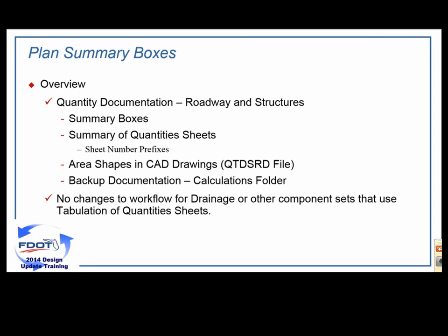The biggest impact with this new process is that it's really mostly the roadway and the structures design groups and those component sets of plans. Every feature that we've got out on our roadways, all the work that needs to be done, so all those pay items, they have to be quantified within the summary boxes.